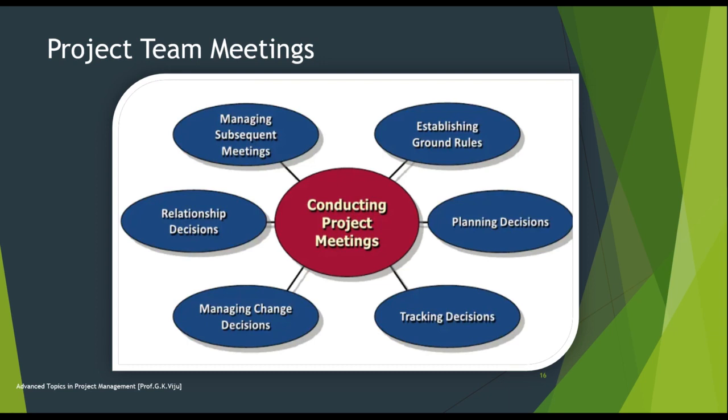So understanding the project meeting types is the key to developing an agenda that will cover all the required topics of each meeting without getting off track. Some of the meetings are regular team meetings. This meeting is the most common and frequent meeting type over the project life cycle. Whether they are daily, weekly, or monthly, they are scheduled in the communication management plan.